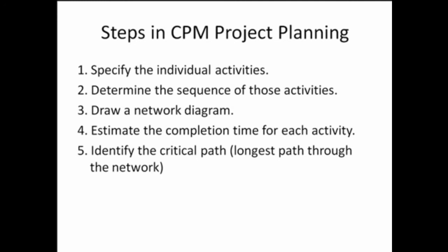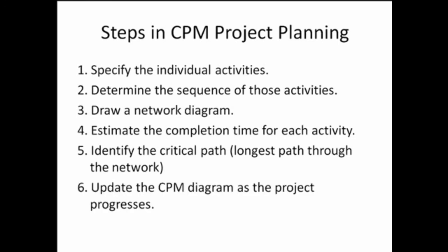The significance of the critical path is that the activities that lie on it cannot be delayed without delaying the project. Because of its impact on the entire project, critical path analysis is an important aspect of project planning. You'll update the critical path method diagram as the project progresses. As the project progresses, the actual task completion times will be shown, and the network diagram can be updated to include this information. A new critical path may emerge, and structural changes may be made in the network if the project requirements change.